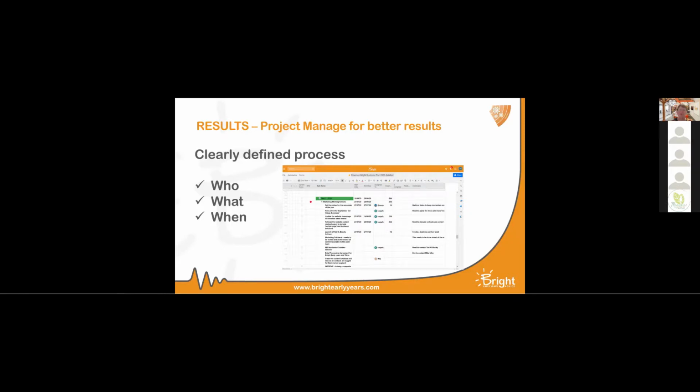But then the second one we could do within a month. And the third one was just an easy integration. We could just say when we were going to do it. So building out that timeline needs to be quite realistic in that respect.